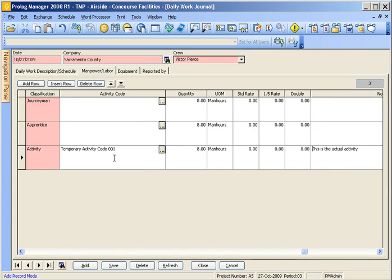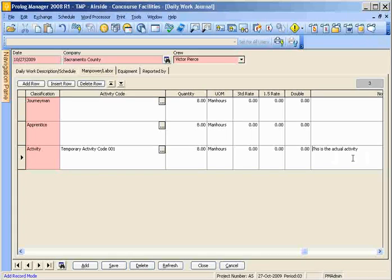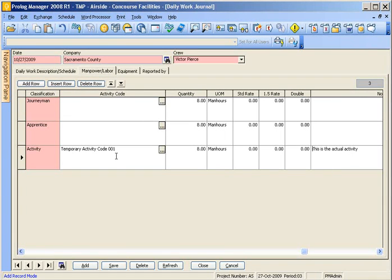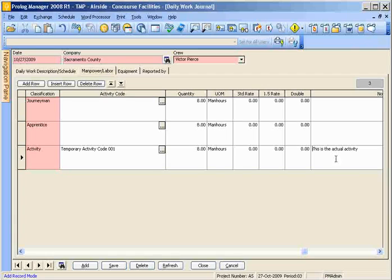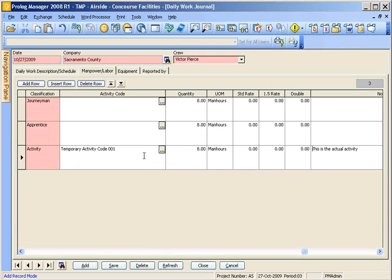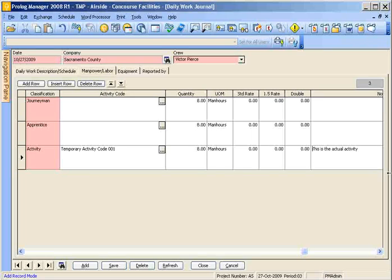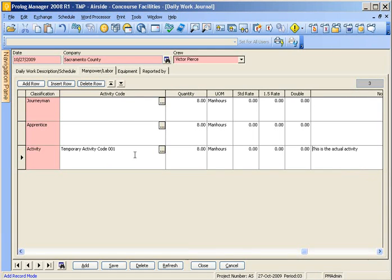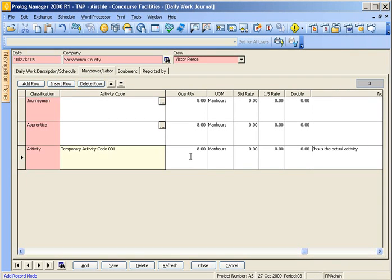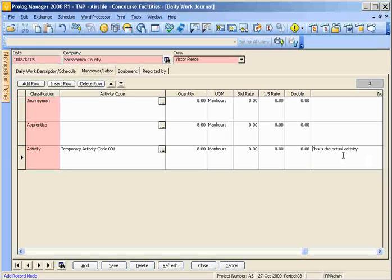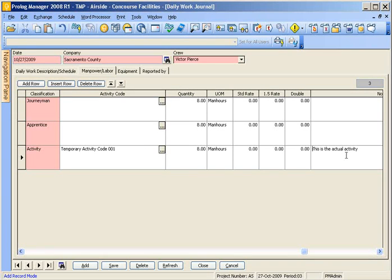And then once you've entered in the description of that activity or your notes for that activity code, you're going to make sure that you log that. There's a spreadsheet that's going to be held in an office where you will actually log what that job was. So you'll find out the activity code, put in the date and you'll add in this information that you typed in here into that log.